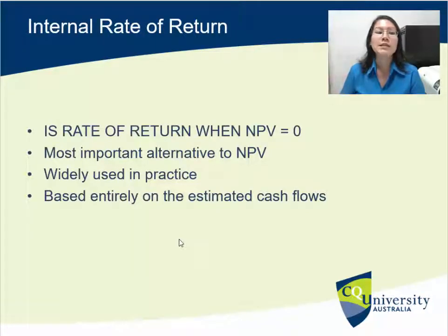Internal rate of return: if you understand how the discount percentage works with net present value, you'll understand internal rate of return. It's simply the rate of return when net present value is 0. It's the most important alternative to net present value in practice, and it's widely used because managers like to think in terms of rates of return. They like percentages, they can understand percentages. So a lot of managers prefer to use IRR. Again, the higher the internal rate of return, the better the project is, and it must be above their preset minimum level.